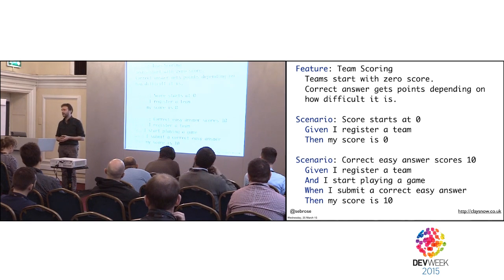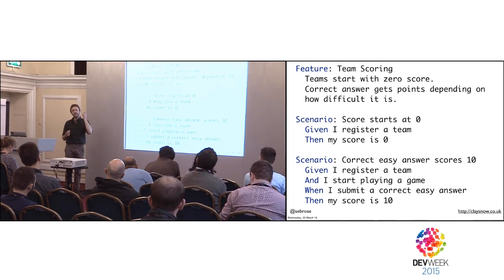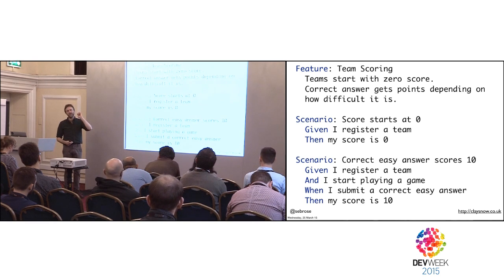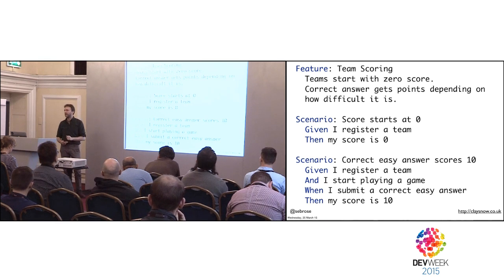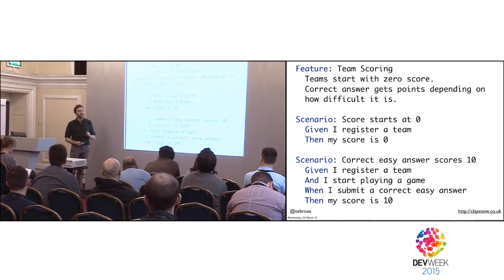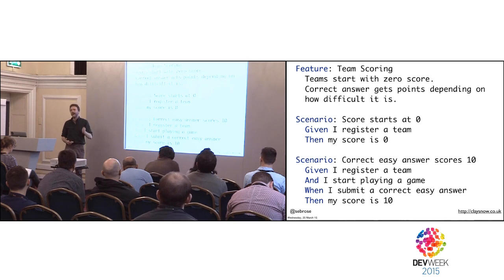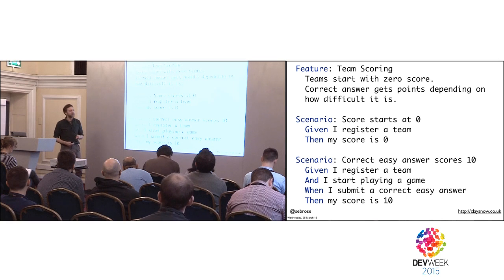There is no mapping between a feature file and a user story. User stories are small artifacts that allow us to deliver a thin increment of functionality, and as soon as we've delivered it, we throw it away. User stories are not documentation. User stories build on top of each other and invalidate the previous ones. User stories are for slicing, scheduling, managing risk.